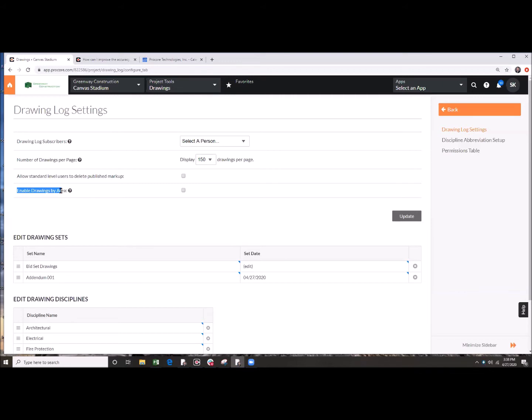But there's also additional functionality that I feel like is available for us there. When I was working in the industry, I used to use areas for my shop drawings. If I wanted to have my shop drawings available for the folks that are building out in the field, I would set up a drawing area. Within that area, I would probably name it structural steel shop drawings or steel shop drawings. And then within that specific area, I can create multiple sets for the different types of shop drawings that I have for my steel work: embed shop drawings, pan metal decking shop drawings. That way I can organize those shop drawings and have them available for the folks that are building in the field, but I'm not going to have them mixed in with my architectural drawings. So it's a really nice feature there.